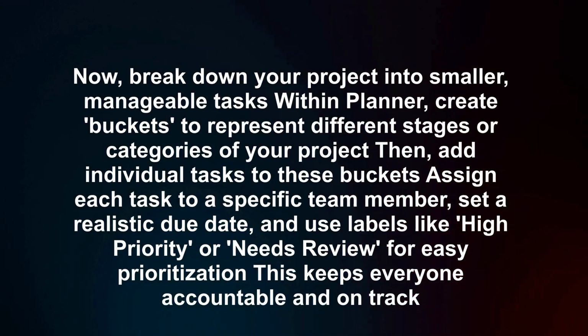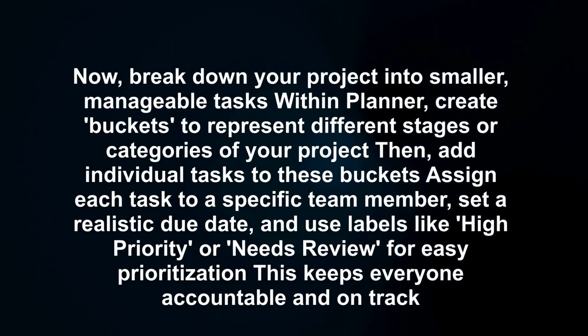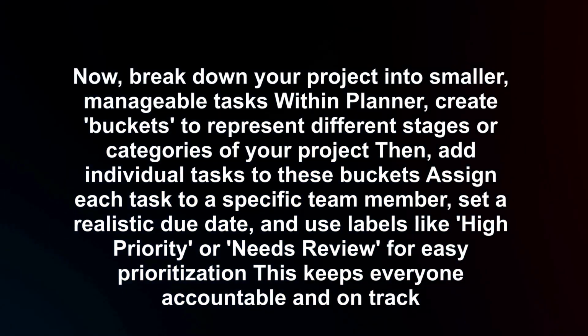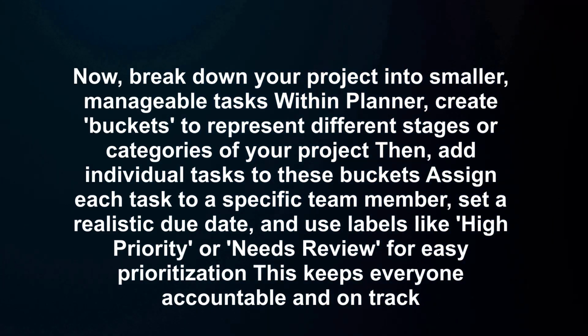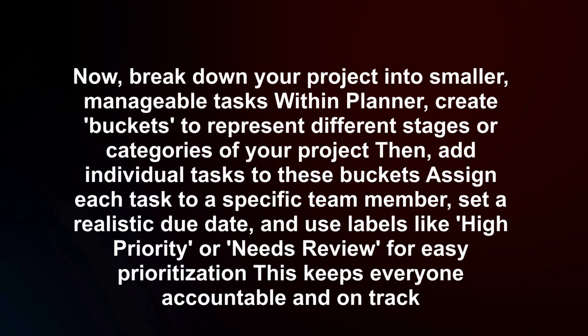Now, break down your project into smaller, manageable tasks within Planner. Create buckets to represent different stages or categories of your project. Then, add individual tasks to these buckets. Assign each task to a specific team member.